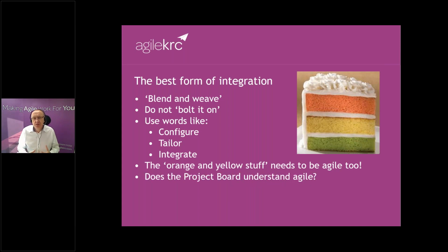And to try not to just be general here, let me give you some specifics. The project board, or your steering committee, or steerco, they've got to understand Agile. They've got to know how it works and what it's doing. So a typically easy example would be to see what they are tracking. If a project board are tracking, with the project manager, whether you're on schedule or not, well, the answer is going to be yes, because we're time boxing.